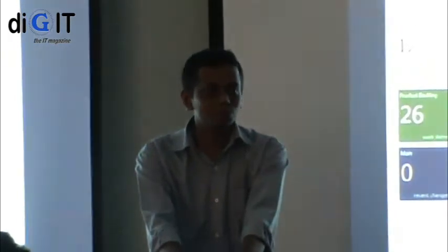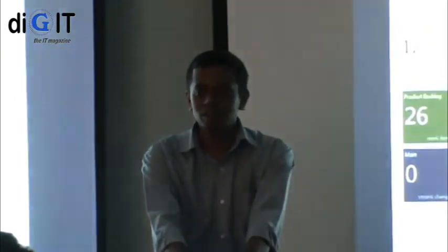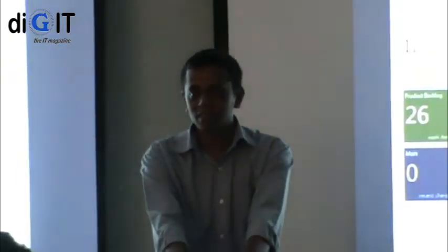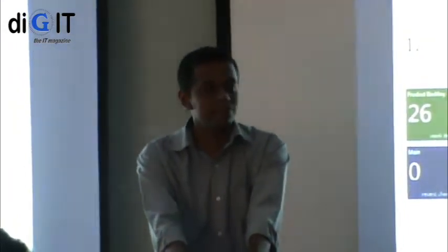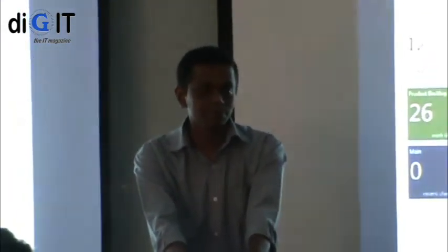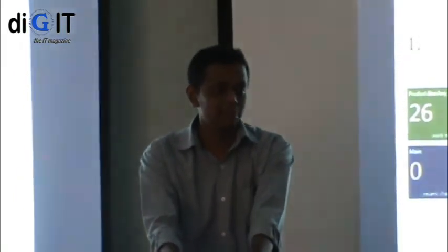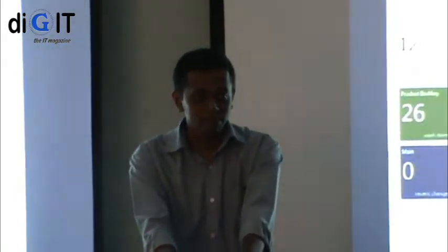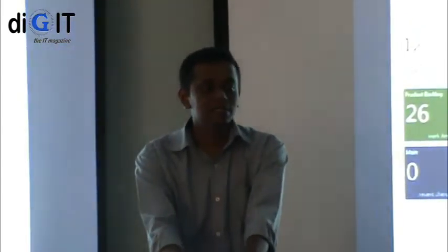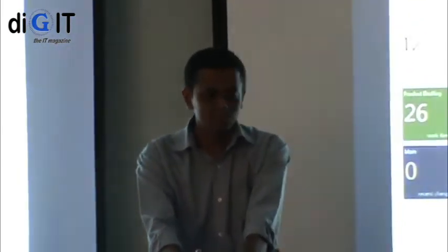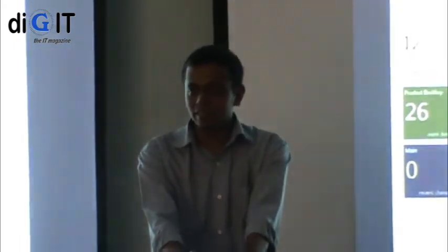is it possible for us to change? Yes, obviously, because we have about 5 months and a week. If we know this by the end of 5.5 months, what will happen? We only have 2 weeks to achieve what they expect. That's not enough. So the best thing is to deliver and iterate. Yes, 100% correct on that. So how can we do that?